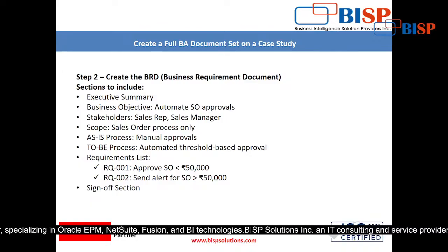The reason is that many times, I remember in one of my projects, there were 5 stakeholders of the order to cash process, but at the end one stakeholder says that NetSuite is not working according to his requirement. Now in that case, since there was no sign off at that time, we needed to make changes according to the stakeholder's requirement, right?